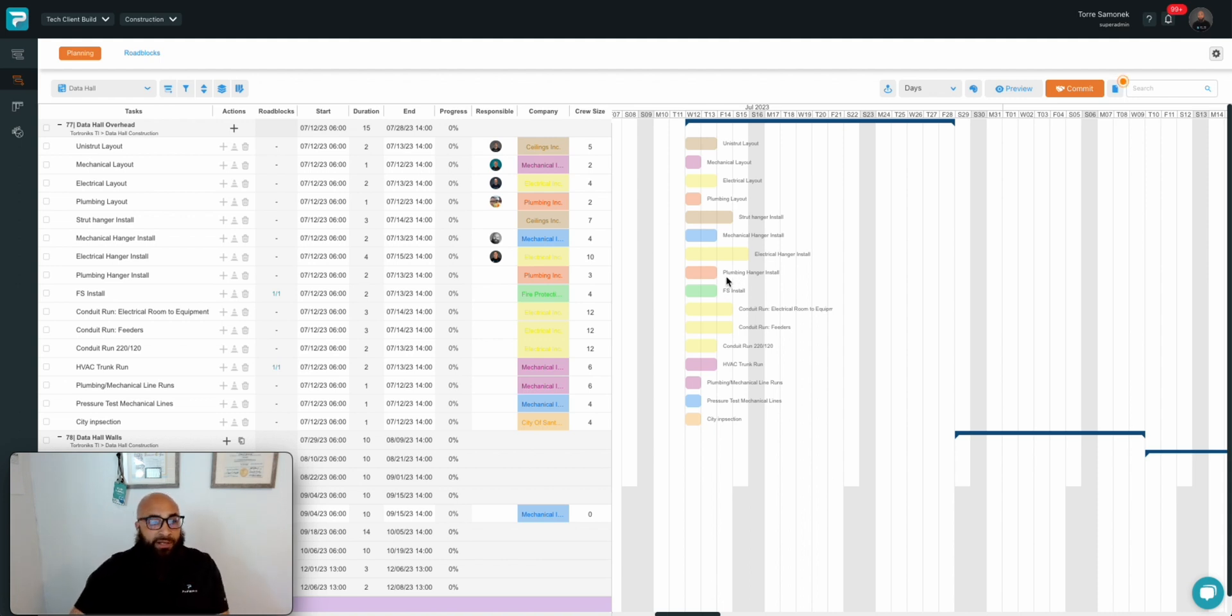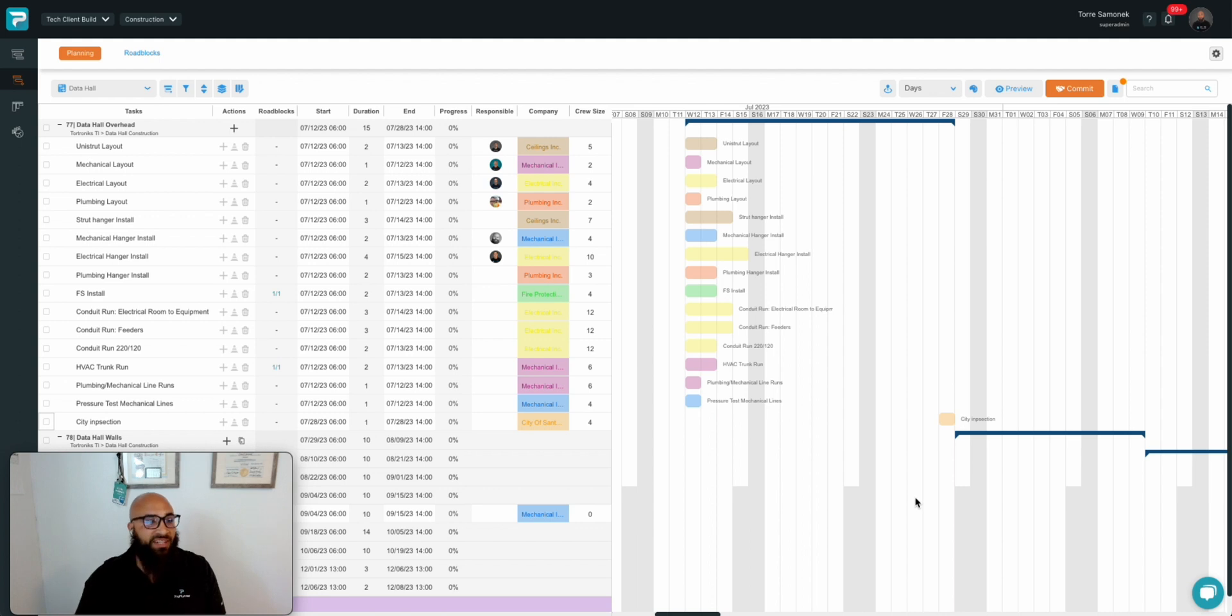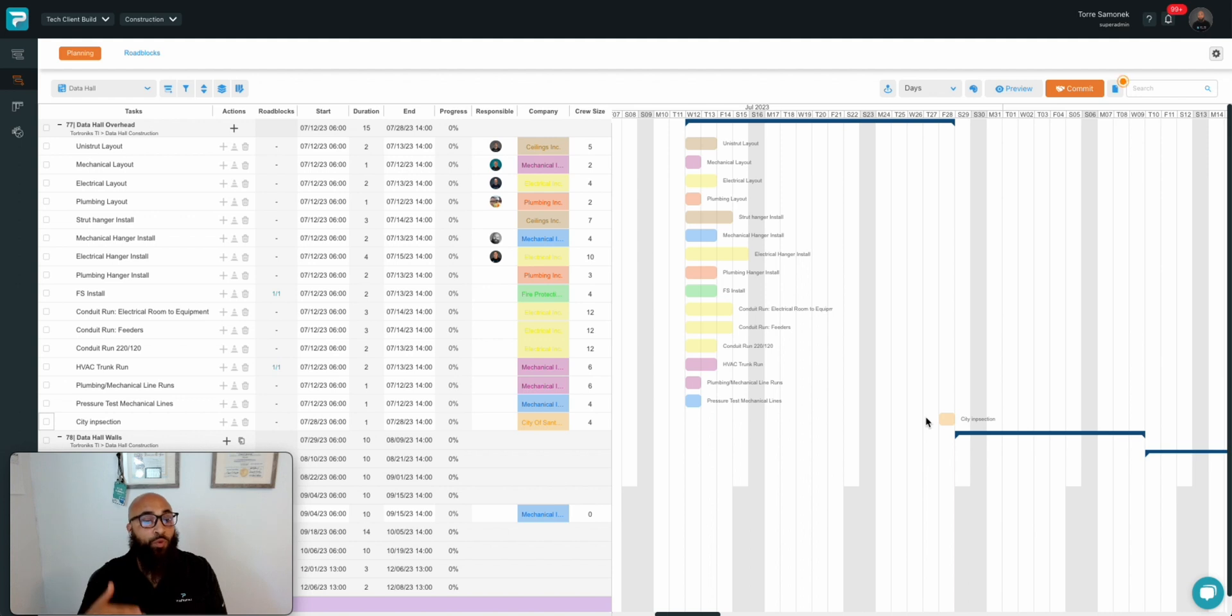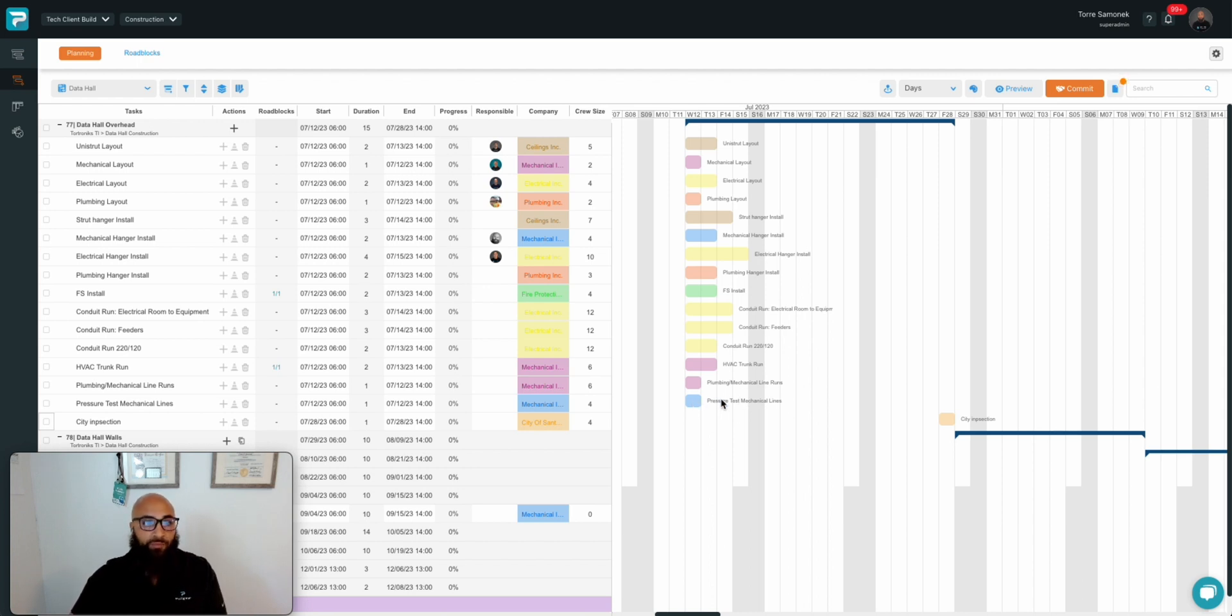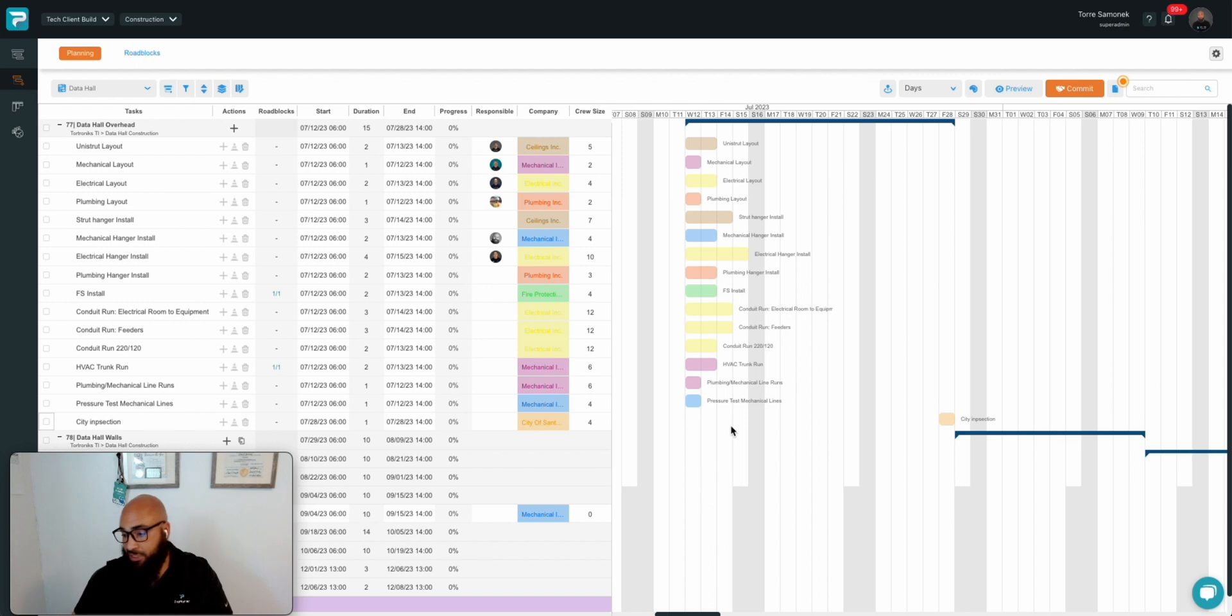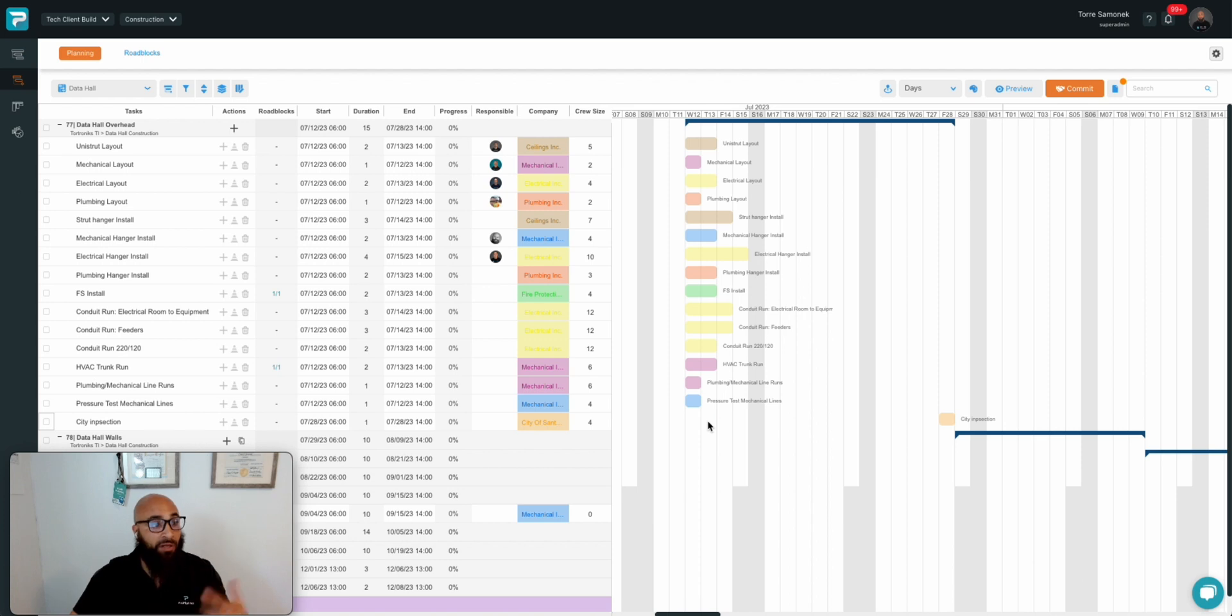Now, to set the target dates for the actual installation of the work, like any pull plan, you're going to start with the first task, identifying what it is we're building up to. In this case, we need to get a city inspection to sign off all of this overhead work. From there, the conversation is: with that understanding that that is the last task to take place, who needs to precede that person, and who needs to precede that person? That's usually how this conversation goes. In ProPlanner, understand that we've already created the task list ahead of time by giving access to the trade partners involved. We can then have that pull planning conversation of who goes next and who goes before pretty quickly. In this case, we were able to identify these tasks and come up with somewhat of a sequence.